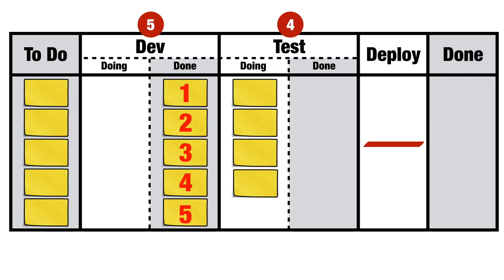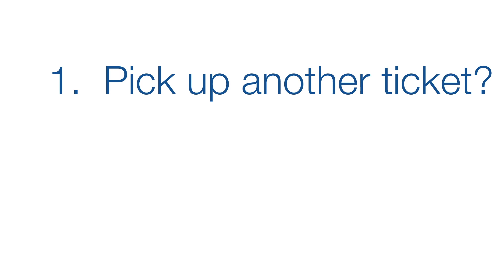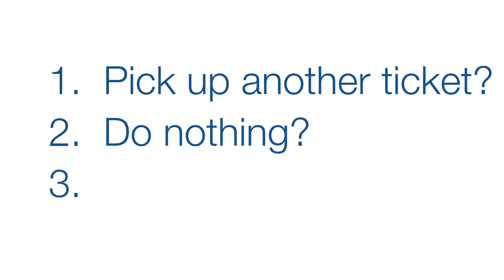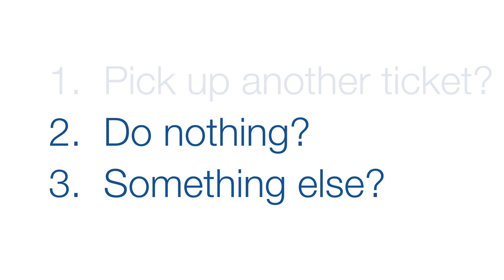Let's throw a little spanner in the works. Develop is at capacity, and all of that capacity is in the grey — the entire dev team is stuck, blocked. This might indicate that it's time to beef up the QA/test team, and if this situation crops up regularly, that's probably a good idea. But right here, right now, we have a problem and we need a solution. Question for you: what should the dev team do? Option one: pick up another ticket. Option two: do nothing. Option three: do something else. The WIP limit rules out option one, and that's entirely by design.